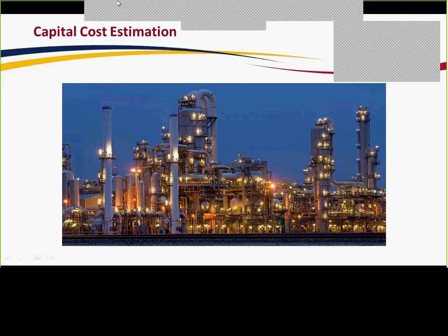Okay, so for pricing the entire plant, we used a Chemicon Excel file where we could input all of the equipment that we have within the plant, and then it takes into account a variety of factors like material costs, piping, installation costs, labor costs, and a variety of different things. And from there, it basically just gives us the total cost of everything and sums it up for us. We can also include different things like utilities, raw materials, and pretty much any factor that we can think of in order to get a total cost overall.